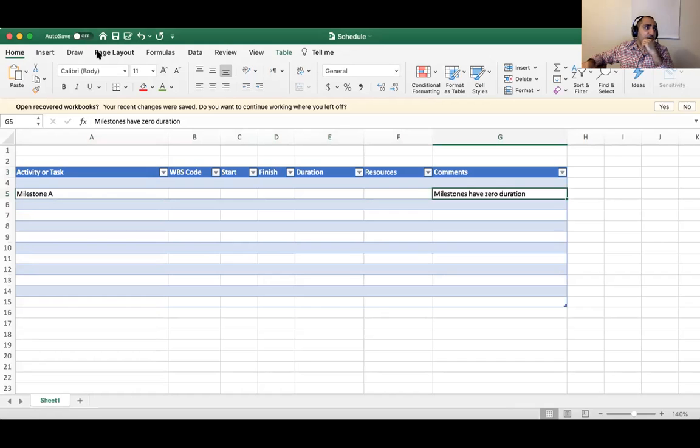You say, I need to attend lecture 1, take notes, and revise at home, then attend lecture 2, take notes, and revise. You put all of this information. Then you say, I sit the quiz. And after you finish all of these activities, you say, quiz 1 completed.